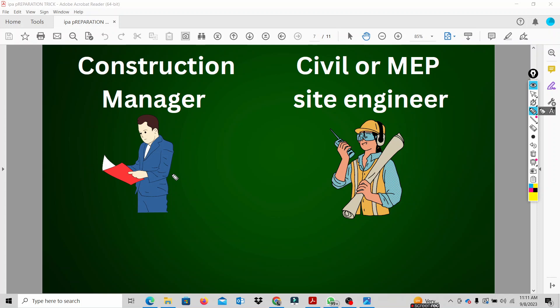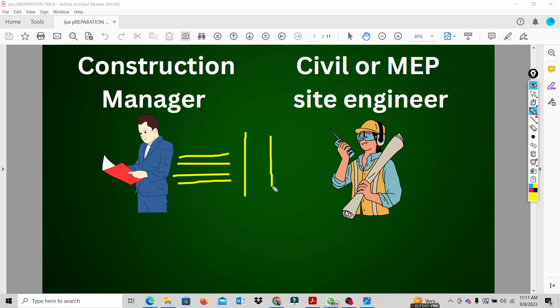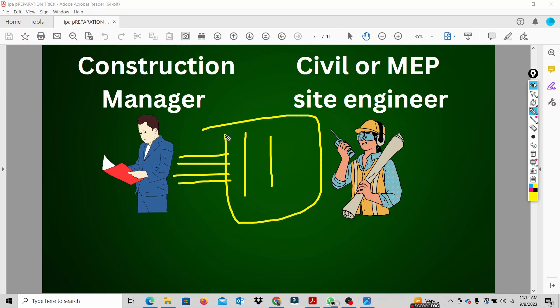This is the important terminology: based on the marked drawings, we can get the actual quantity. Based on the marked drawings, we can calculate the actual quantities completed on site.